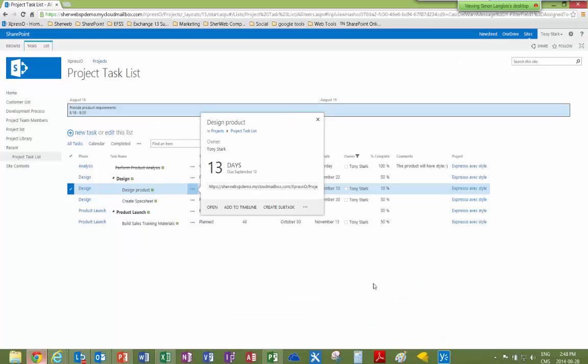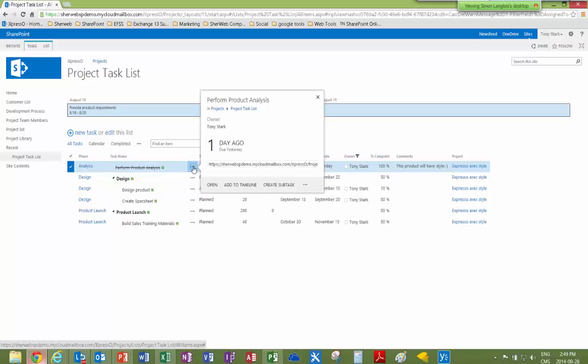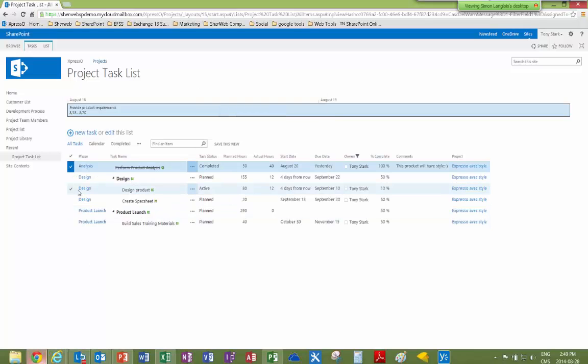Depends how deep you want to go into micromanagement, but obviously two things I would not recommend in SharePoint: one is to specify specific authorization for a task, because you're going to deal with authorizations that are too hard to manage. Or alerts, same thing with alerts. At some point you will lose track of where you set your alerts, and you will have too many emails, which is not the goal here.